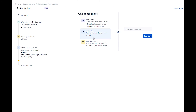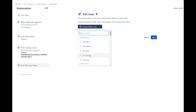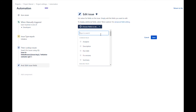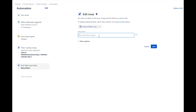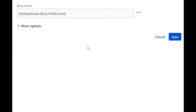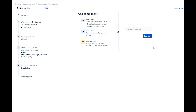Create a new action and click on edit issue. Select the story points custom field. We will use smart values functions to populate this field. The lookup issues is the collection of issues returned from the previous action. Story points is the custom field that the function will be using. Sum represents the smart value function that adds the story points from the lookup issues. Save the action, then name the rule and publish it.